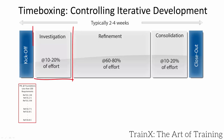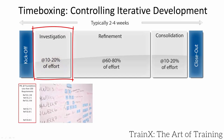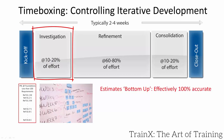Next is investigation, which includes confirmation of the detail of requirements and products to be delivered. The SDT create a timebox plan, which may be displayed on a clearly visible team board. Estimates are now bottom-up and effectively 100% accurate. Agreement is reached on the detailed acceptance criteria and any KPIs and other measures of success for the timebox. Stipulations for these may be in the management approach definition — for example, timebox review records may be required, with the team leader ensuring their production to capture feedback that may shape plans moving forwards. Investigation ends with a review which informs the next section, refinement.